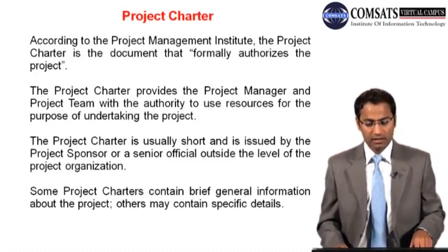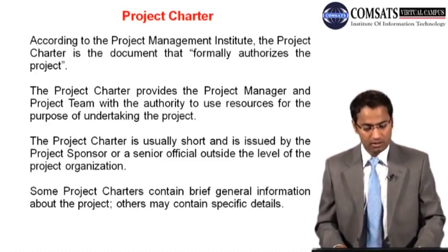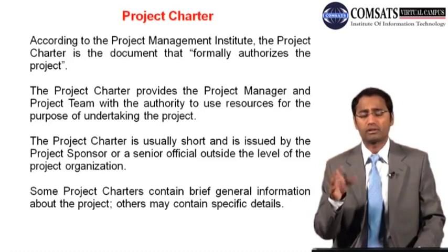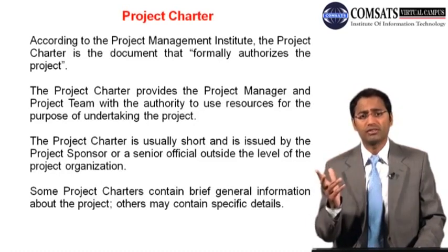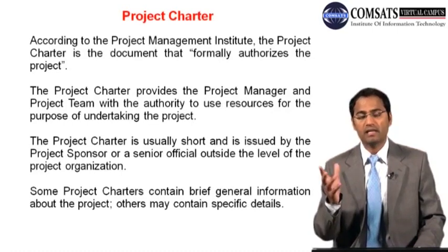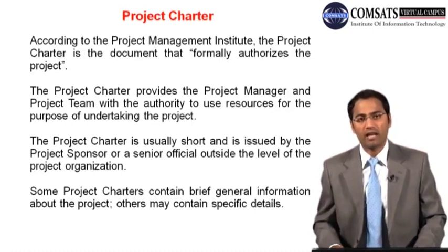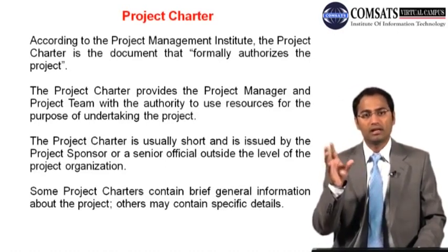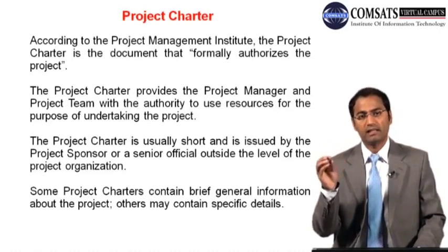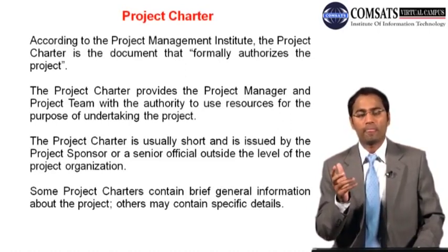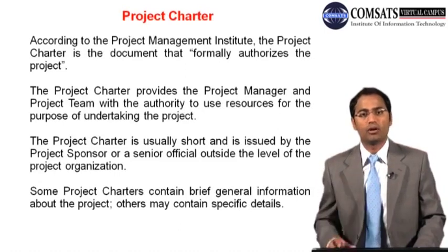Some project charters contain brief general information about the project. Others may contain specific details: the name of the project, the probable cost, the probable duration, initial risks, requirements, constraints, and the pre-assigned team. Pre-assignment is the concept. You do not have the project team while you are initiating the project, but some of the guys or girls have been decided by the project manager, and he has requested the top management to give those resources to him. This type of acquiring is called pre-assignment.